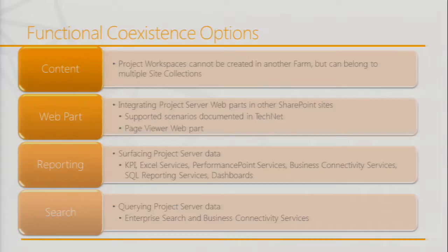And the next question I get is those milestones and tasks. How do I search that? And the easiest way is to leverage, I've done a blog post, I use SPD, SharePoint Designer. You can use BCS, Business Connectivity Services, if you want to be fancy. But I just access the reporting database, which is supported in the Project Server world. That's the only one that is supported. So please don't write queries against our published database. And I surface that using FAST Search, and now I can search. Give me all the resources that are DBA. Give me everyone that went to the attendee party last night, et cetera, et cetera.